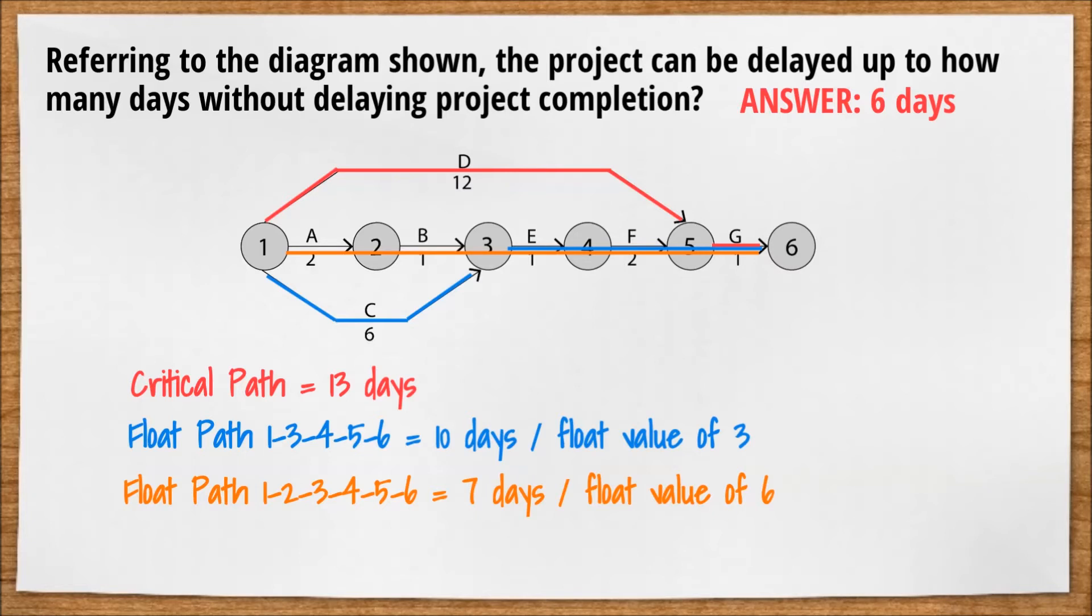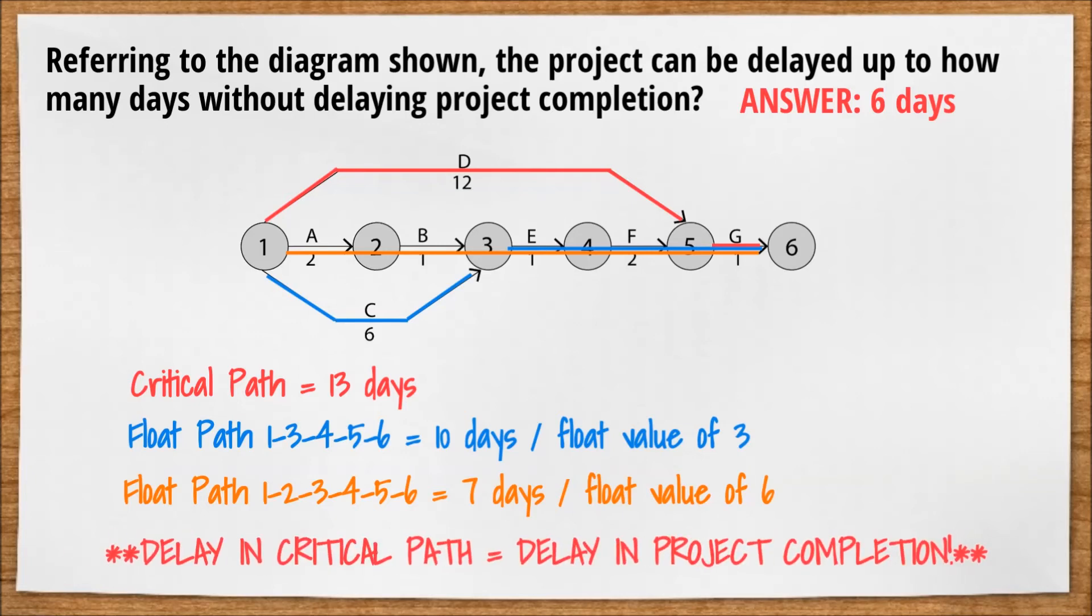But keep in mind that any delay must occur between activities 1 and 5, because 5 and 6 are part of the critical path, and the critical path cannot be delayed. If the critical path gets delayed, the project completion date will be delayed.